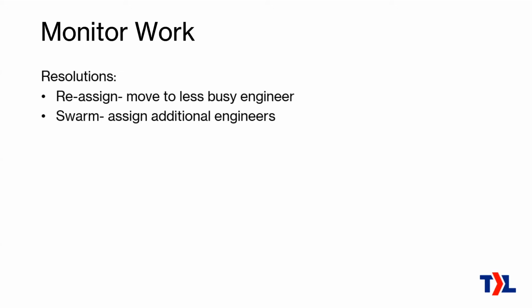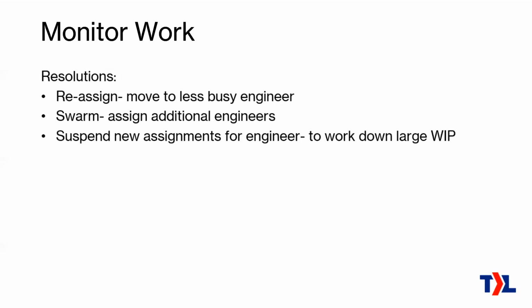One technique is to swarm a ticket. That means to assign a bunch of engineers. You basically assign your whole team or part of your team. Say, like, this is our number one priority. This is some sort of critical ticket, or it's an important customer and they've been waiting on it a long time. We're not working on anything else till we get that one ticket done, or at least get that one ticket unblocked and moving forward. So that's called swarming it.